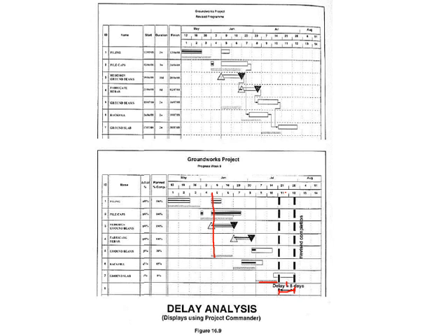Just as a closing note, even though the employer risk events amounted to some 18 days, the contractor extension of time entitled is only 4 days. Okay, so this is the whole scenario. So the entire project moved out with 18 days. This is because the overall delay was only 8 days, because the ground beams activities was non-critical.